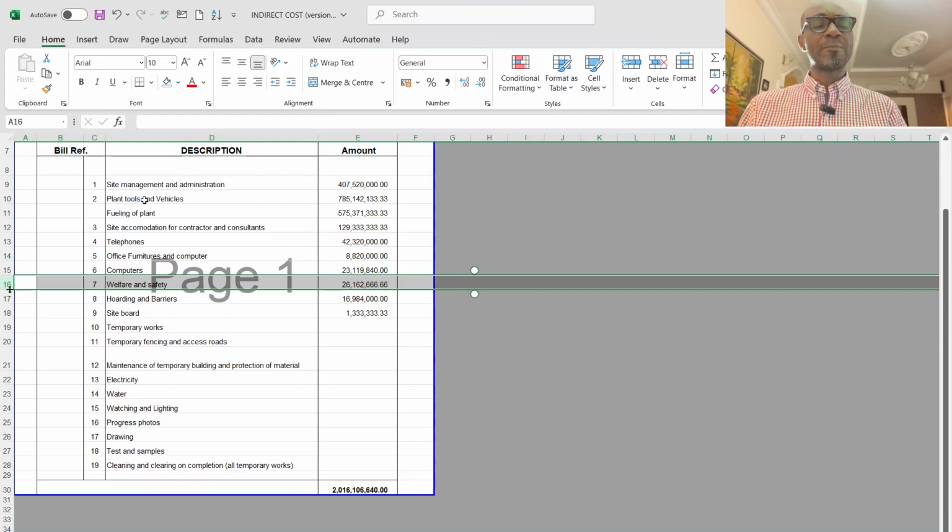And I did say for the plant and equipment, you need a site installation drawing and a bill of quantities to measure this item appropriately. And in this video, I'm going to use a sketch, a typical site installation drawing, to better explain some of the things that made me say that information is of vital importance.